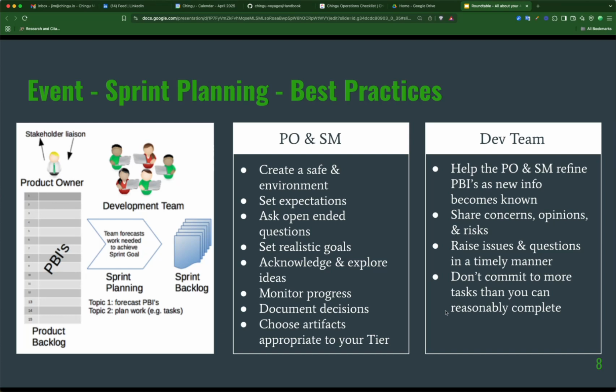And so what happens is you tend to procrastinate. You tend to put off working on a task. You might be spending a lot of time studying, so that you can be ready to work on that task. But as a result, the project starts running over schedule, because something isn't being completed as fast as it should be. So in a case like that, that's actually a concern and a risk.